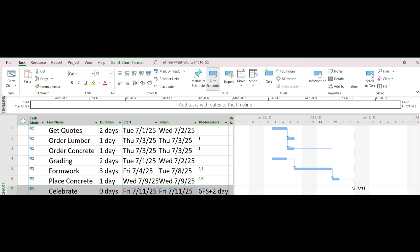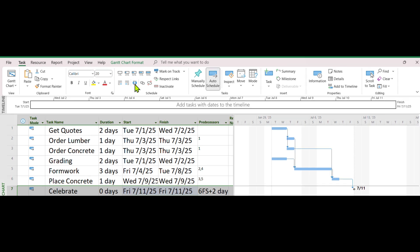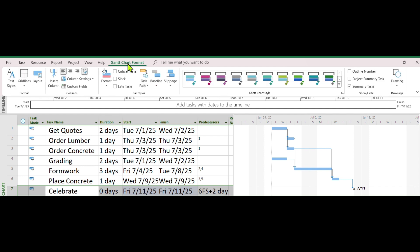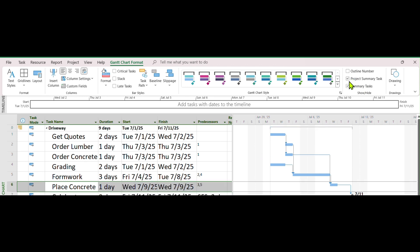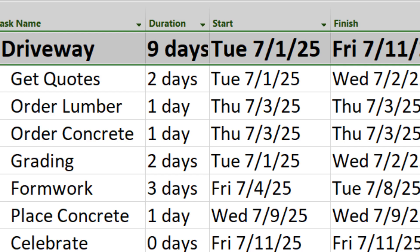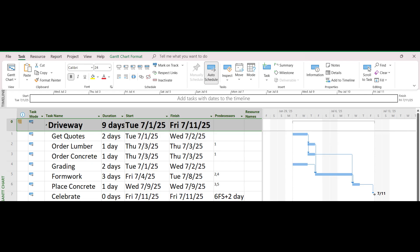We want to organize the tasks a bit. Click on Gantt Chart Format tab. Ensure both Project Summary Task and Summary Tasks are checked. Now you have a new task, Driveway, on top, which is the Project Summary Task. We will insert 2 new summary tasks as phases.